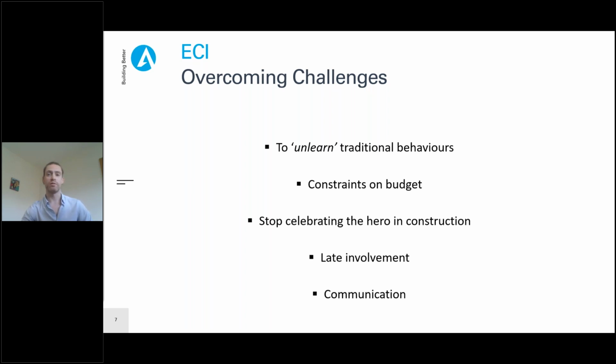However, it is important to not confuse ECI with additional design hours. It is not about increasing or extending design. Rather, it is about utilizing an optimized designated planning phase for a project with the help of contractors, so problem solving commences ahead of construction. Where design hours are applied at a pre-construction stage, these can be taken from the back end of the construction program, where they would normally sit in a traditional approach. The same amount of design hours can be used, but in the case of ECI, they are used at the right time.